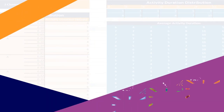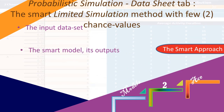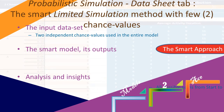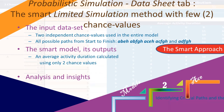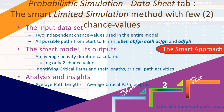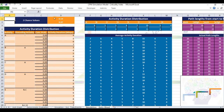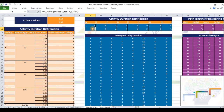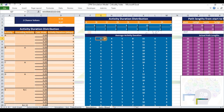In the tab titled Simulation Data Sheet, we avoid generating 8000 random numbers and performing an equal number of VLOOKUP operations. Instead, we employ simulation to generate a sample of two values, then use Excel's data table function to automate the generation of a smaller sample of size 99. Thus, we automate the construction of the blue color table of activity durations for 99 trials. The model then performs the remaining computations as done for the previous two tabs. This is the smart limited simulation method with just two chance values as opposed to generating 8000 random chance values.